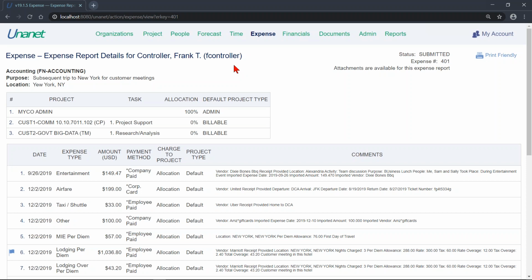And it's the same way for timesheets. In fact, I missed this. I'll go back and do it here in a second. When an employee puts an entry on a time card, that entry on that time card goes into project cost in real time. So literally, if two of my employees put entries on their time card for today and save them, I can go into my job status report and I can see those two entries for today.